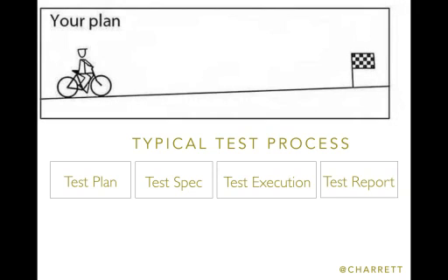And only when they've signed off the test plan can we start thinking about the test documentation, the test scripts. We write all our test scripts and then we get them reviewed and signed off. And it's only then that we can actually start testing. And we'll have a milestone too. Often there'll be a sort of checklist where thou shalt not start testing until all software has been developed and completed, thou shalt not start testing until all test environments are ready, and really quite stringent milestones like that.